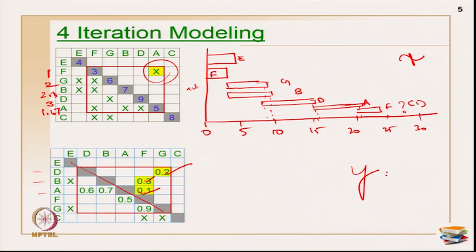So, primarily what happens is, if you are doing the iteration modeling, you can also skip the tiering process and do this iteration modeling immediately after your partition DSM is done. That is also an option. Okay. You can evaluate all your